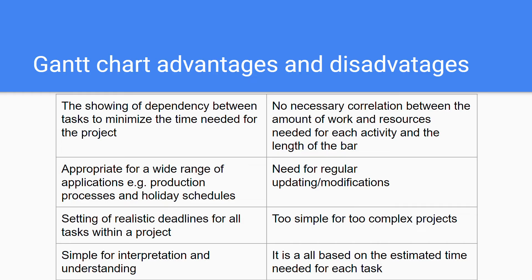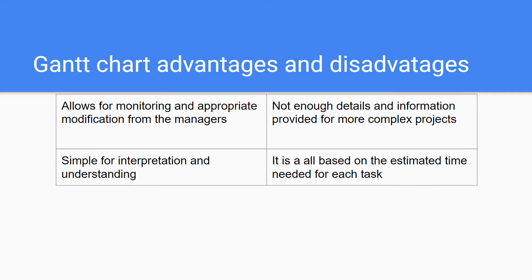A disadvantage would be that it is all based on the estimated time needed for each task, meaning that if one estimation of a task is very skewed and very biased or very wrong, then this can lead to the modifying of the whole thing. Basically, they are all dependent on each other. And if there's something wrong, then often the whole thing is a bit skewed on the next side.